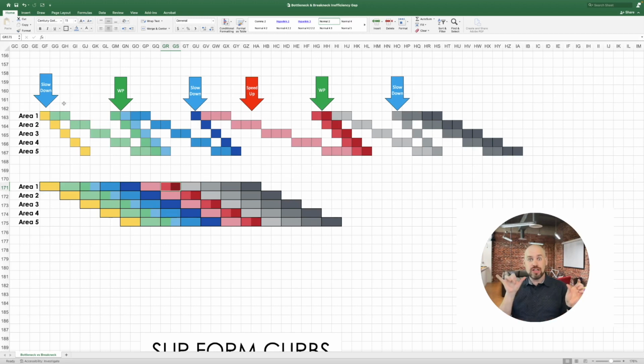Is that worth the change on the end of the schedule? Were we able to save the actual 17, 18, 20, 42 weeks on the entire schedule? And if that's the case, think of how much GCs actually cost for any size of project, and is that cost comparison worth it? And now we can actually make a decision. Should we be doing this or should we not? And is there something else we can do? Is there a different option to optimize that might not be as cost impacting, right? So those are the things that we look at when designing or planning our production.